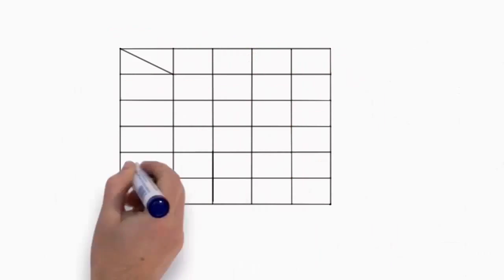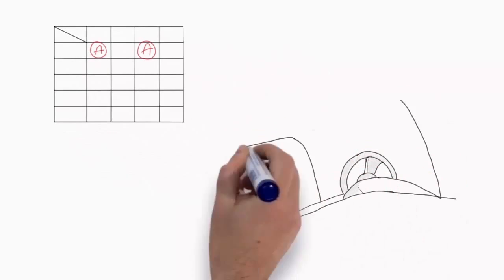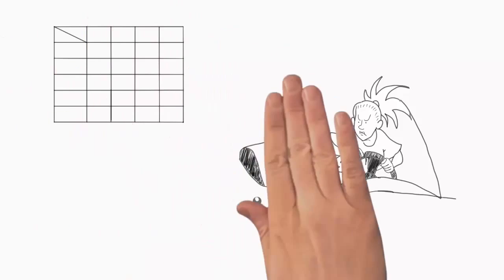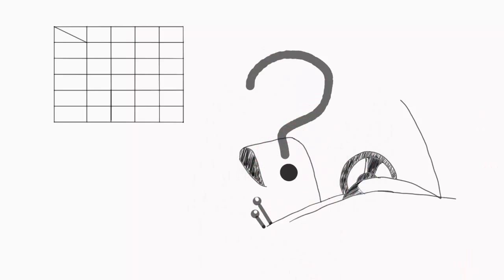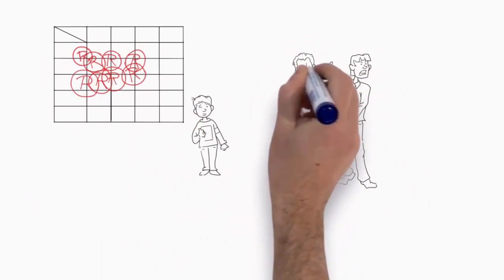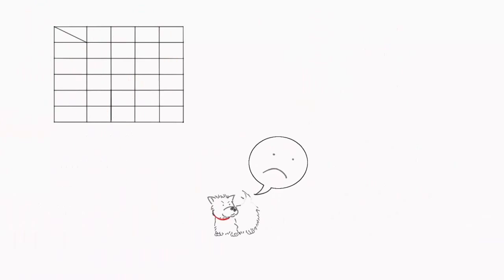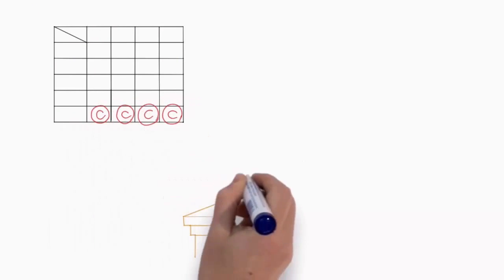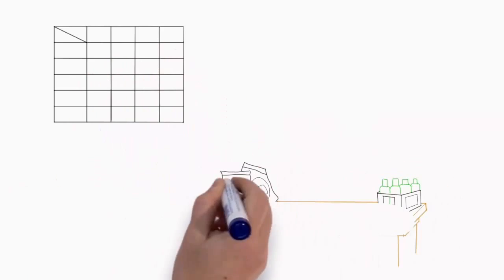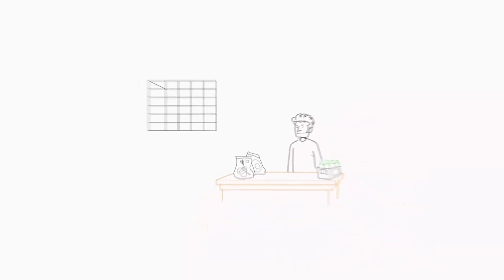An analysis you should perform on your RACI chart is to see if we have more than one A, more than one person accountable. Sorry, that is not possible. Only one role per task can be accountable. You can't have more than one person driving the bus. No A's, this is also not possible, as you need at least one driver on the bus for each activity to be performed. If you've got heaps and heaps of R's for one activity, you may want to ask yourself the question, do we have too many roles responsible here? If you've got no R's for an activity, it won't get done. If you've got too many C's allocated to a task, you may be confronted by paralysis by analysis. No C's and no I's on your chart could be a sign of not having enough communication within the teams. So it's a really good idea to analyze who's doing what.